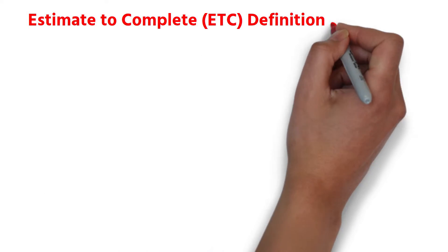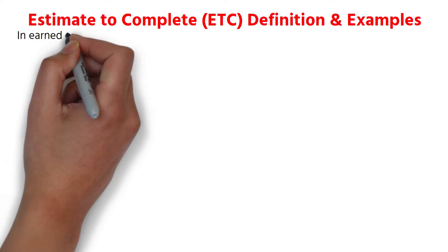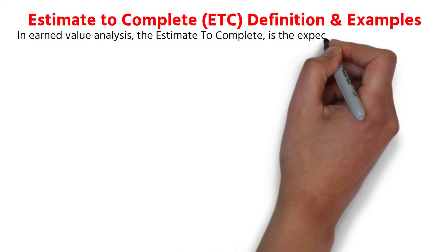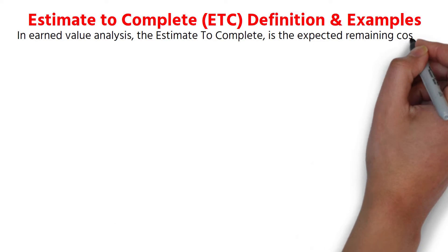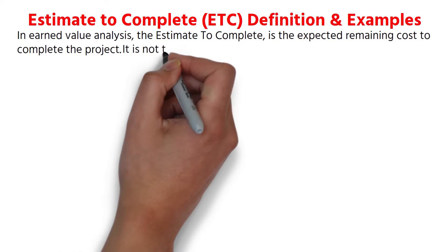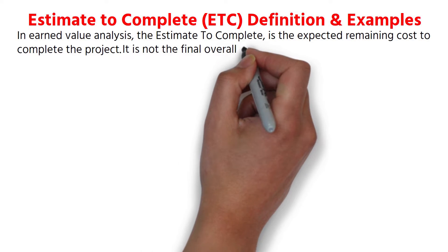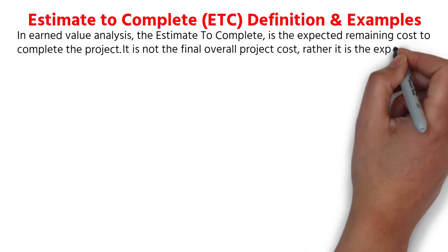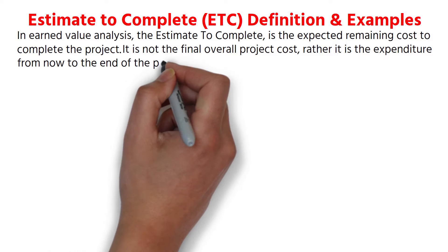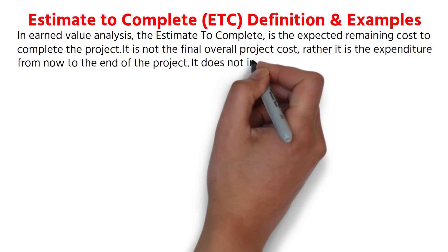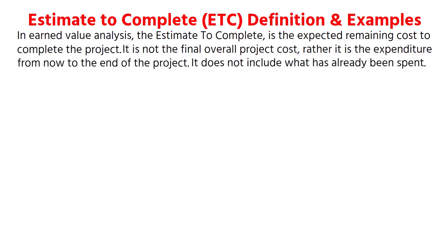Estimate to Complete: Definition and Examples. In earned value analysis, the estimate to complete is the expected remaining cost to complete the project. It is not the final overall project cost; rather, it is the expenditure from now to the end of the project. It does not include what has already been spent.